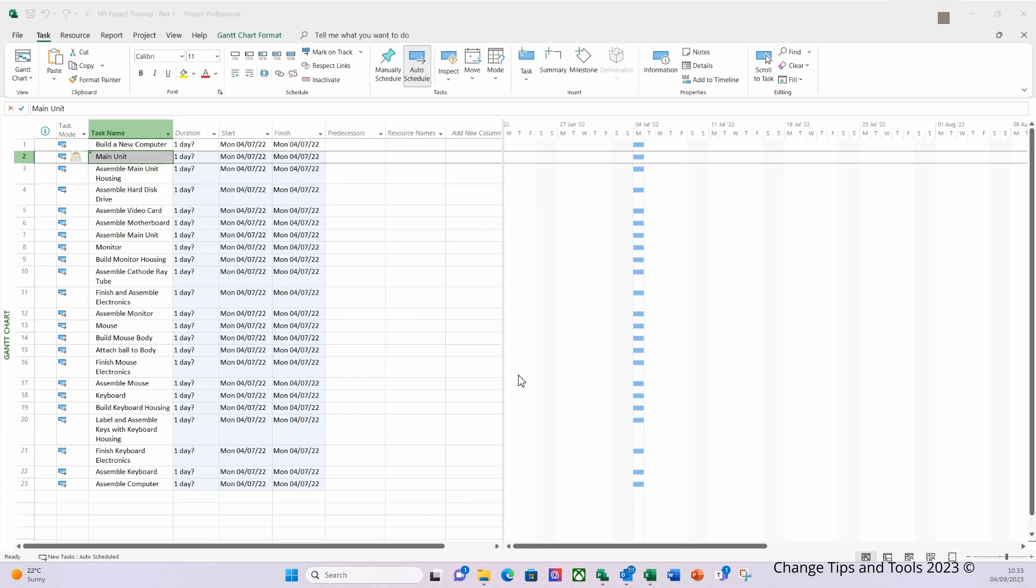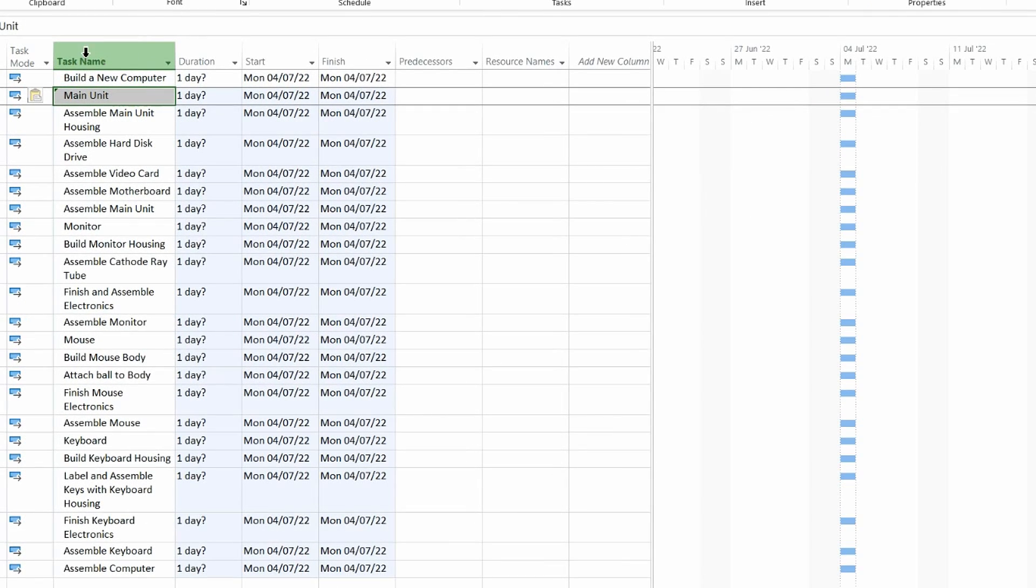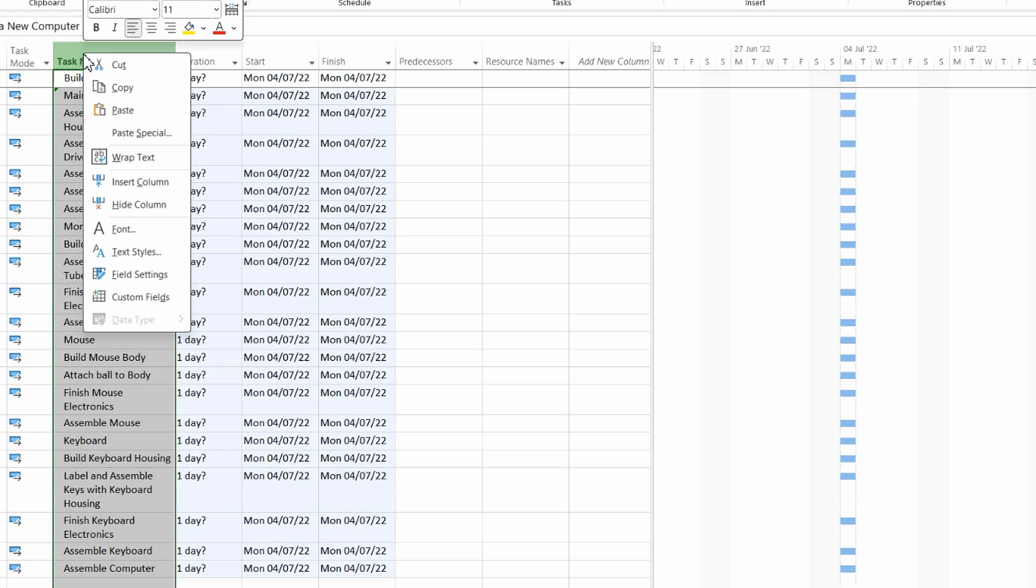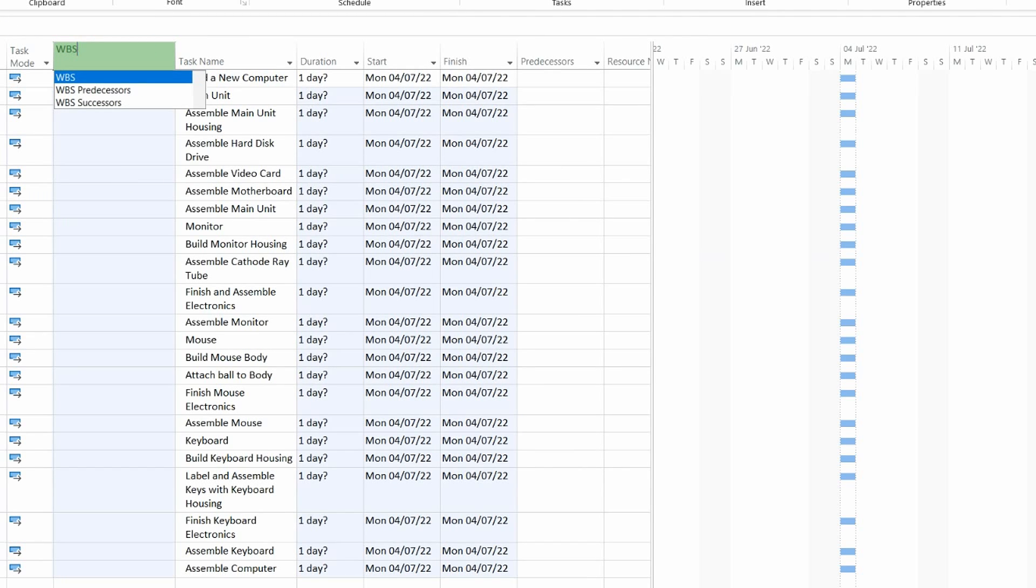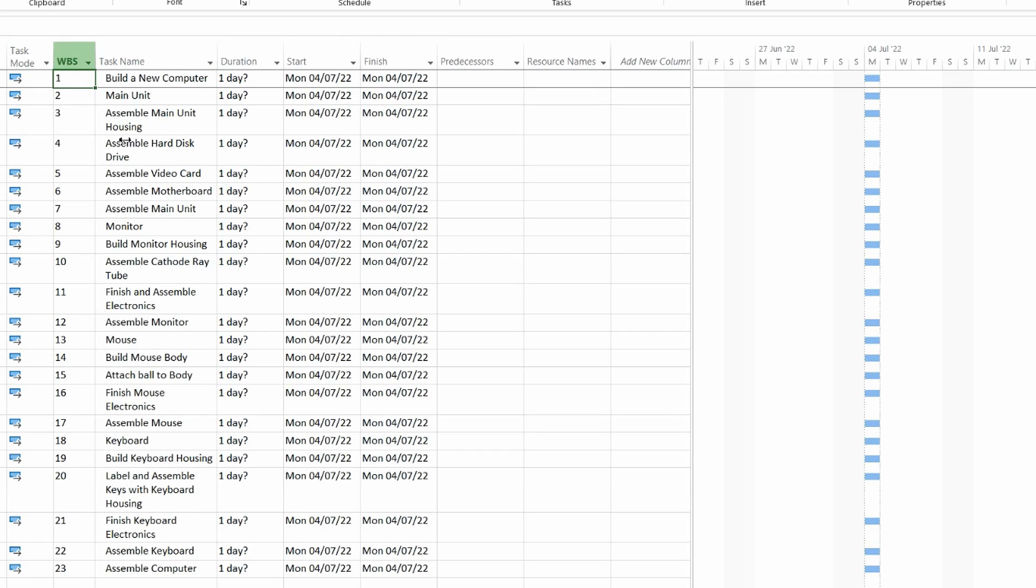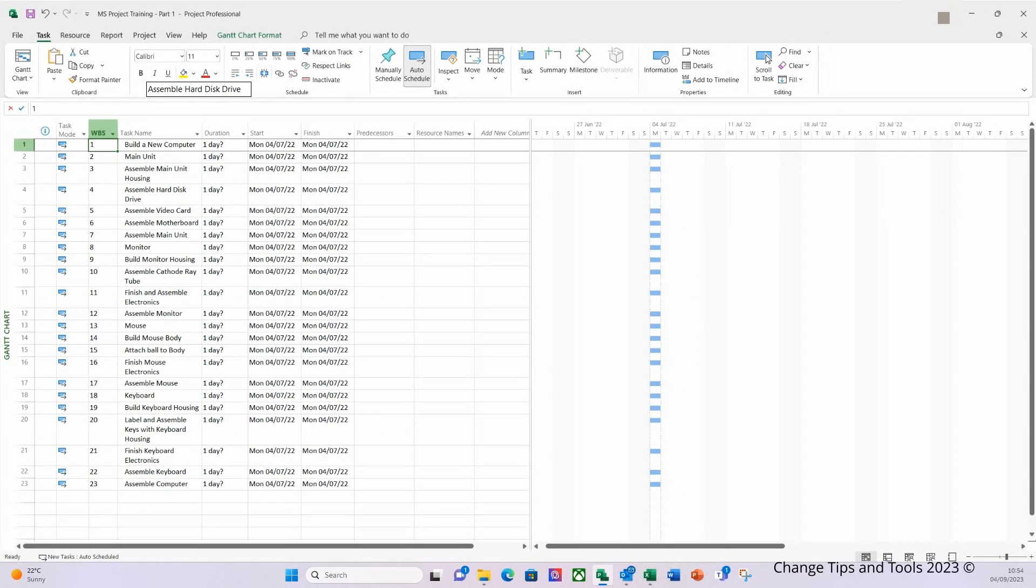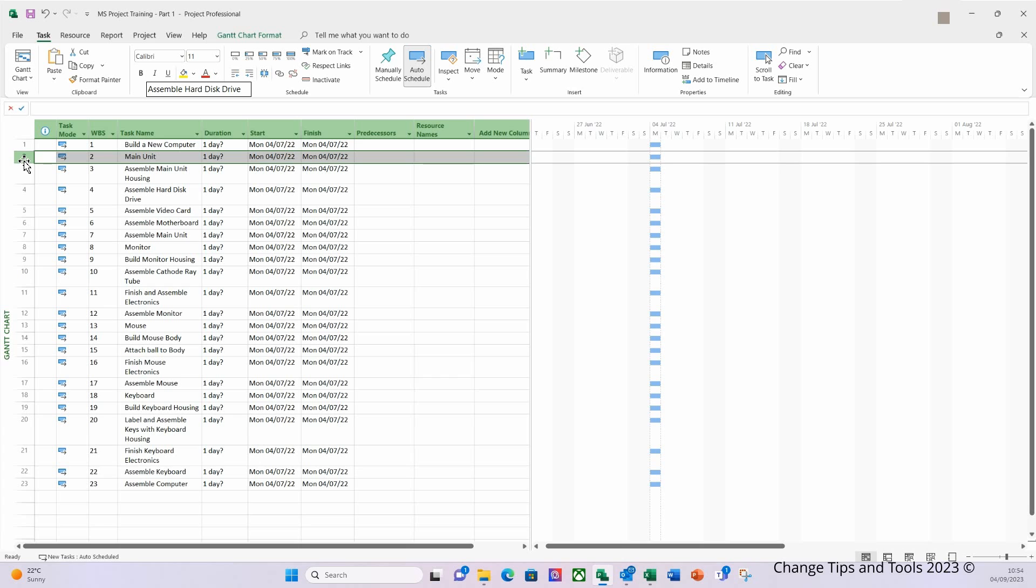What I'm going to do to demonstrate how this impacts the work breakdown structure numbering is I'm going to insert the WBS column. I'm going to right click on the task name, I'm going to select 'Insert Column,' and then type WBS and then I'm going to select it from the drop down. And I'm just going to shrink this down so it's not taking up all the space. And now you can see the WBS numbering right here. Now keep an eye on the bars over here on the right hand side within the Gantt chart. So as we start to indent, you can see the numbering changing over here in the WBS and also a change in the graphical Gantt chart also.